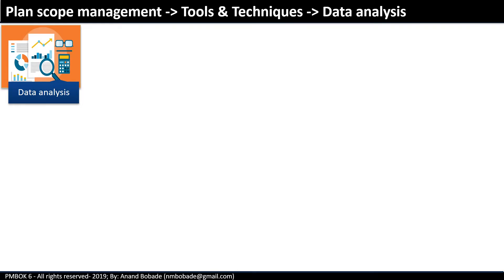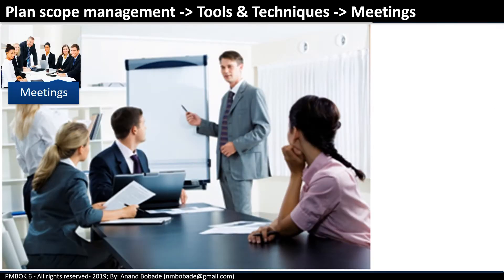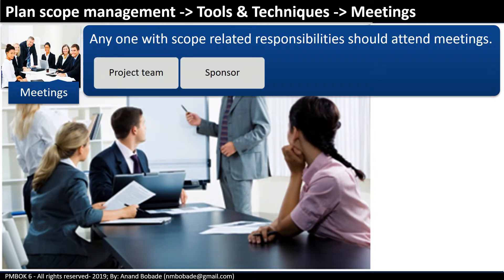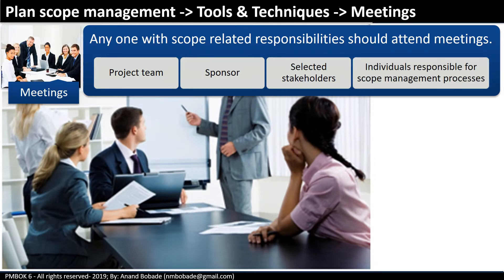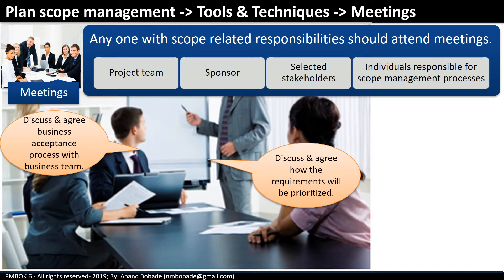Data analysis: the technique used in this process is alternative analysis. There may be more than one way to achieve a certain requirement, and after brainstorming, a decision must be made about which alternative to pursue. Alternative analysis helps the project manager reach agreement between various stakeholders. Meetings: scoping exercises involve many stakeholders and require meetings. Attendees, besides the project team, include the sponsor, selected stakeholders, and those responsible for scope management. Meetings may be held to discuss and agree on how requirements will be prioritized or to agree on the business acceptance process.